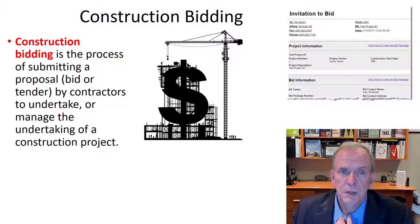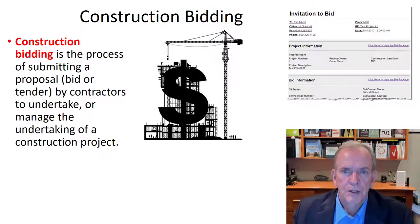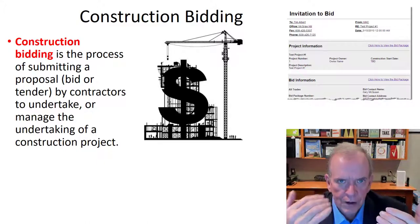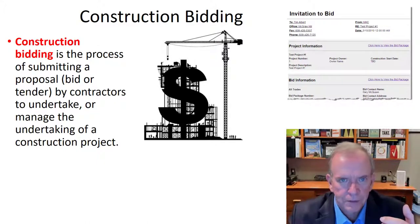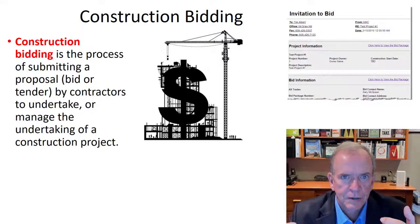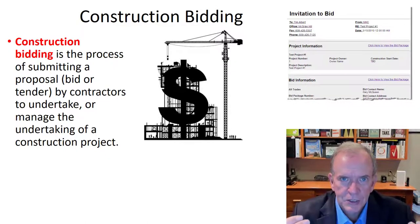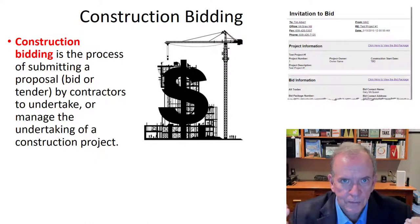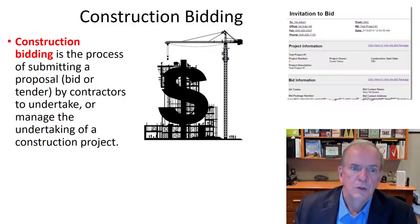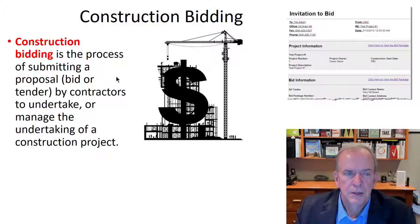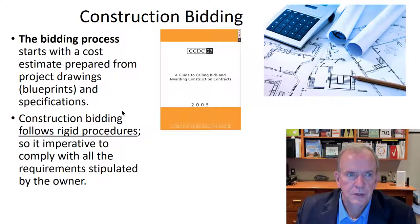Government projects may lean more towards money because there's a lot of effort that goes into the pre-qualification process. If contractor A pre-qualified — meaning they've done similar projects, have the financing, and have the expertise — and contractor B has the same, how can a government agency not give it to the lowest price? You've said they're both able to do it, and it's taxpayer dollars, so those are some of the things that come into the bidding process.